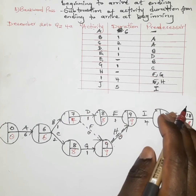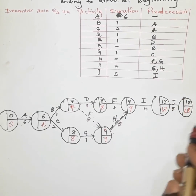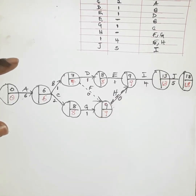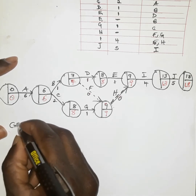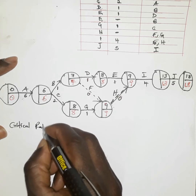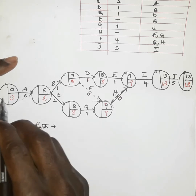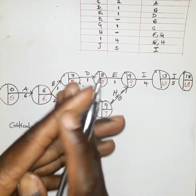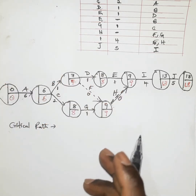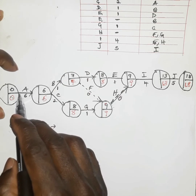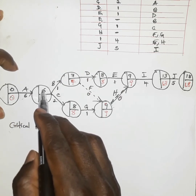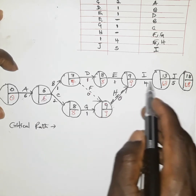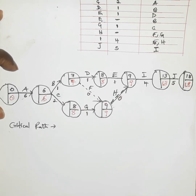We have actually proven our network diagram — that is how to do the forward pass and the backward pass. Now you will be asked about the critical path. The critical path refers to the longest duration which will be undertaken in the whole project. There are two ways to determine it: one is by looking at those activities which have the same starting time and ending time — all these activities have the same starting time and ending time.